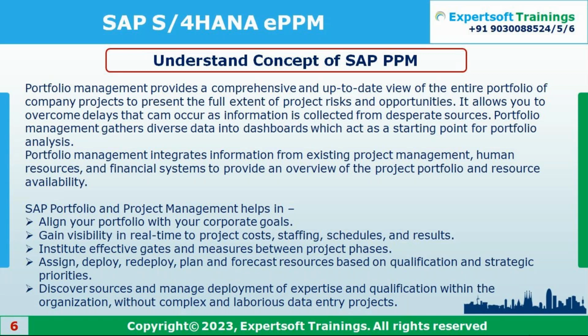So every time these stakeholders will take some sort of decision. Once all the stakeholders have approved that particular phase gate, then you can proceed with the next phase. For example, suppose an implementation project is going on. Currently you are in the kickoff phase. Every stakeholder has approved, and high-level planning was done. Now you are in the BBP phase, which is also approved. Now you are in the realization phase, and maybe you're getting some issue. The cost may be shooting up, or due to some inconsistency between the client and you, you do not want to proceed further.